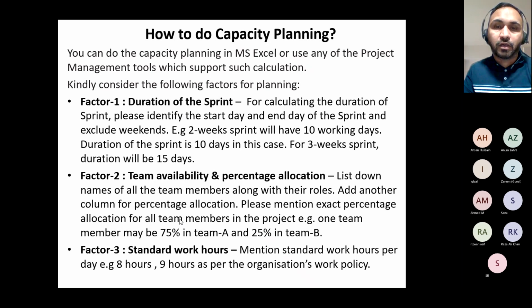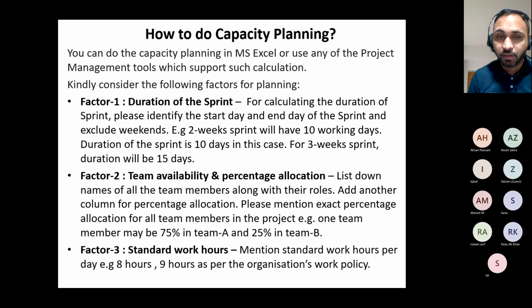Factor three, standard working hours. Although standard working hours are 8 hours, and we count them, do you guys think that they really spend all 8 hours fully focused? No, because the organization's work policy might be 9 hours, with 1 hour lunchtime and 8 hours working hours, right? During that 8 hours, there could be some meetings. They might not be actually working, but they have to attend, right? There could be some coffee breaks or restroom breaks, all those things, right? We are not robots, we are human beings. So you say 8 hours, but in reality, you end up spending less than 8 hours on actual work. And I will show you in a minute.